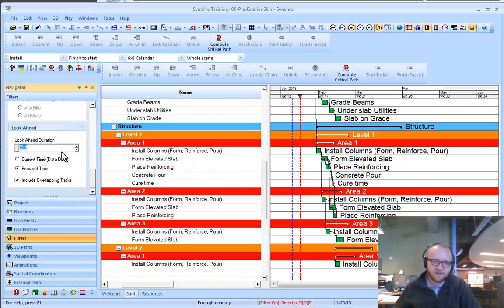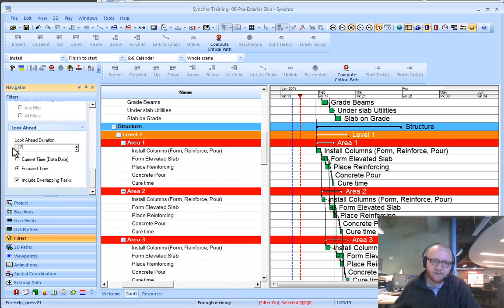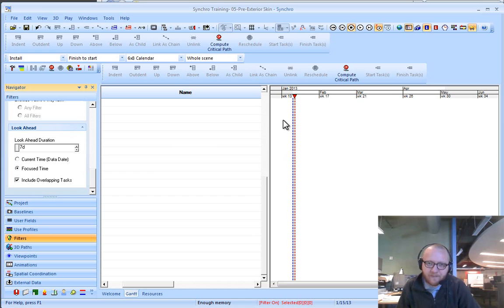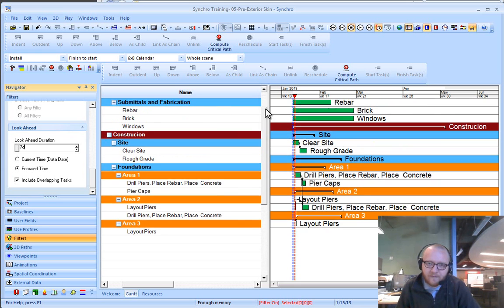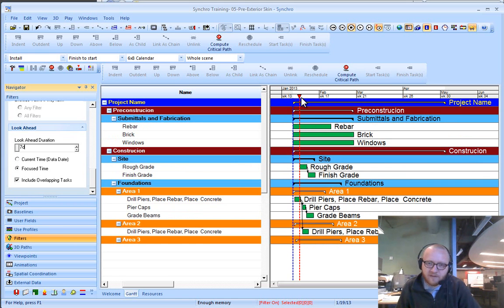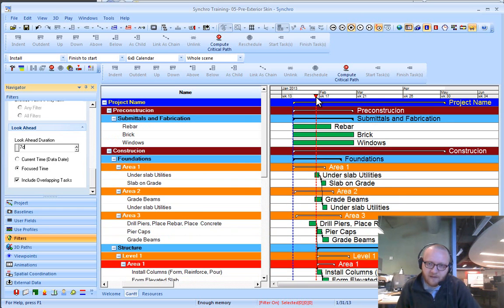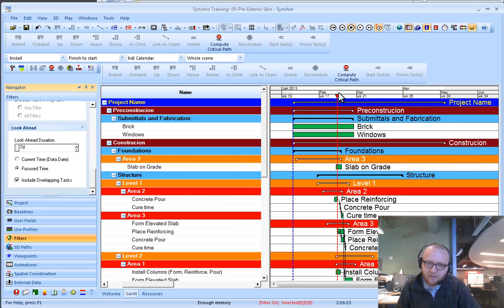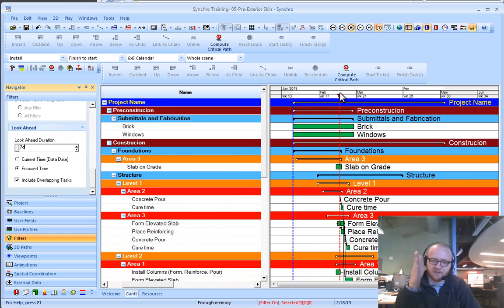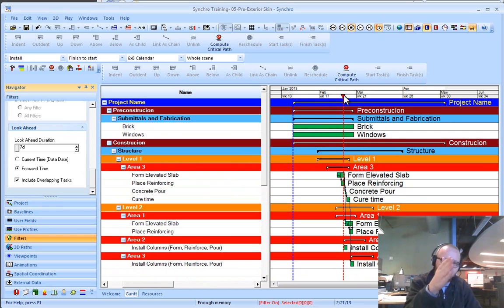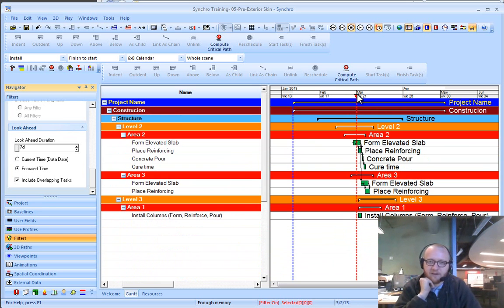What this is saying is lookahead 7 days from my focus time. If I move this focus date along, I can scroll it along at the top of my screen. What it's doing is just taking a look at each piece in time and taking a 7-day lookahead from that.